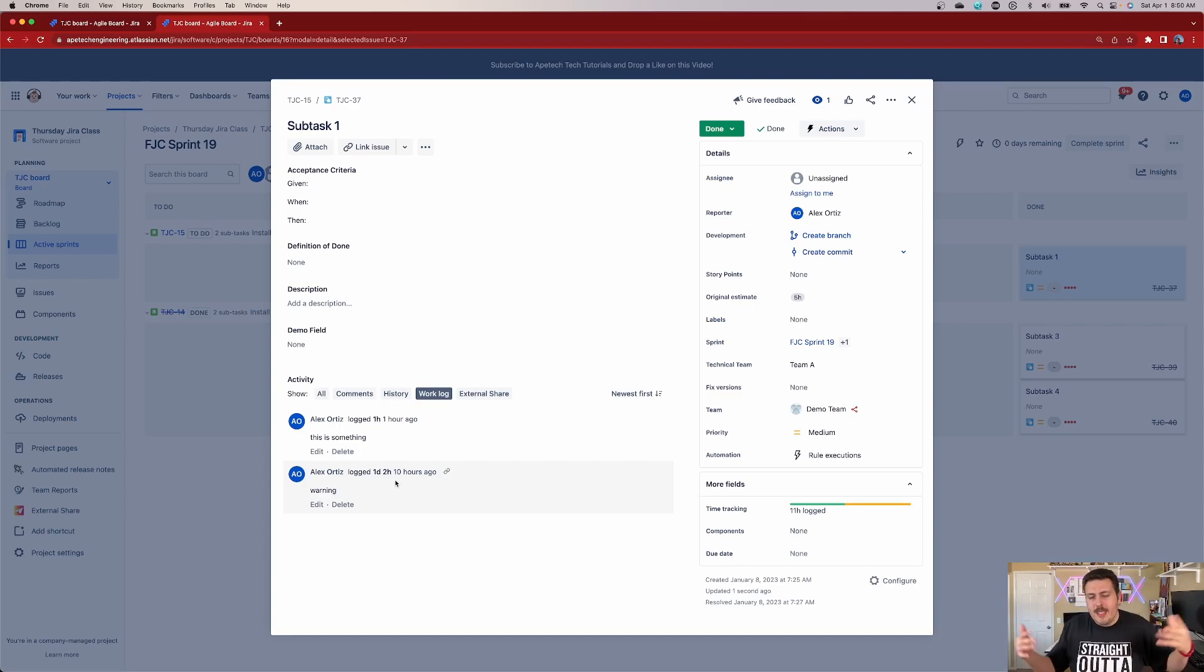So obviously, I'm a team of one, so this is just me. But in this section here, Jira would actually show you John, it will show you Jane, it will show you all the different people that are using this particular issue to log time against. So it doesn't care who's the assignee, it's just going to track and record every single individual that has logged hours against this particular issue.